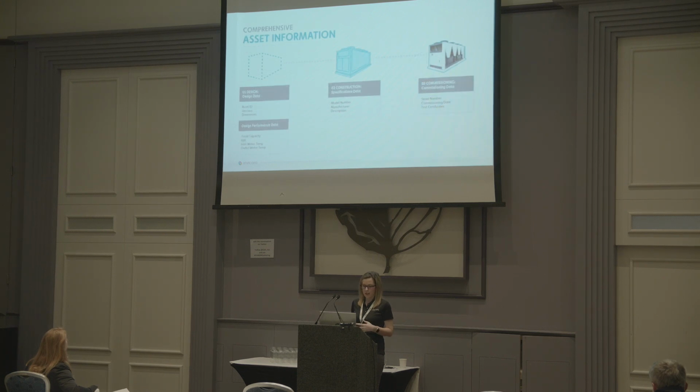The various stages that we would collect and assess data is as per you can see. So the first stage being design data, which is collected in 2 phases. Initial design data and then design performance data. Design data being the what is it, where is it. Design performance data is what was the design inlet water temperature for this asset, what was the design outlet water temperature.